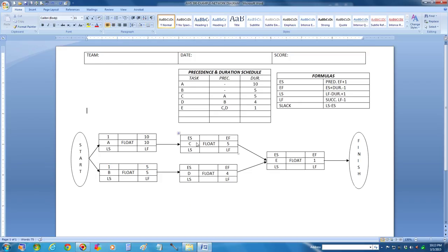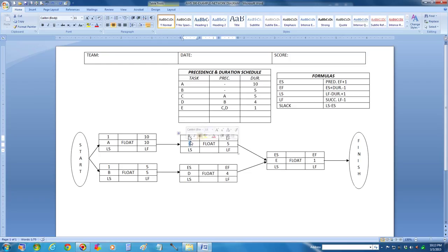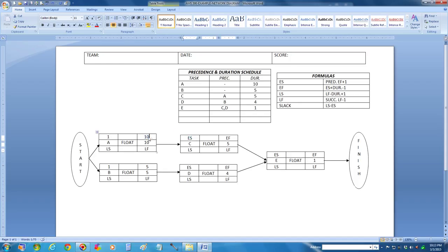Let's move to task C. Its earliest start time, according to this formula, is its predecessor's earliest finish time, which was 10, plus 1 — you add one timekeeping unit — so it's 11. Let's calculate earliest finish time: earliest start time of 11, plus the duration of 5, minus 1, gives you 16 minus 1, which is 15.